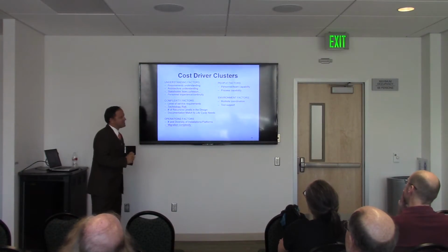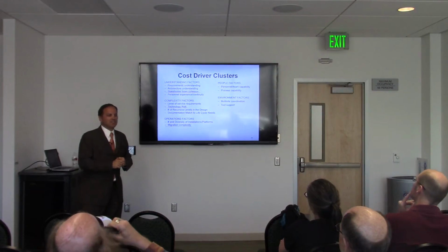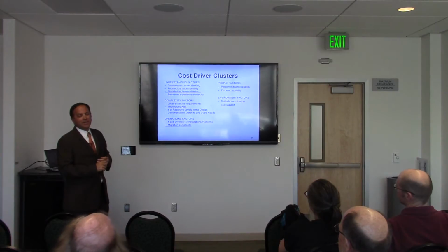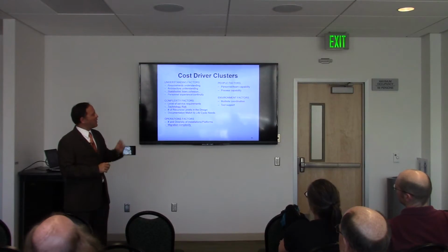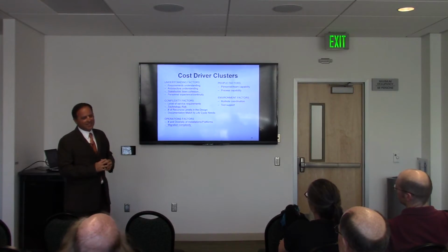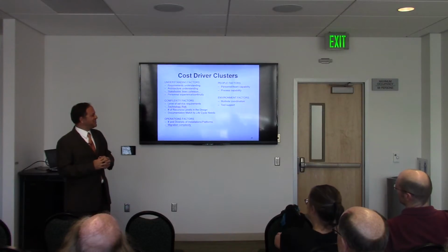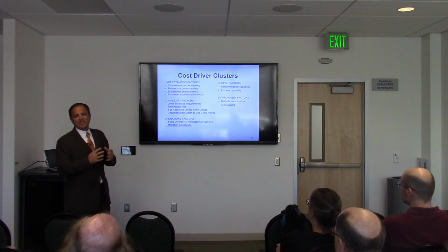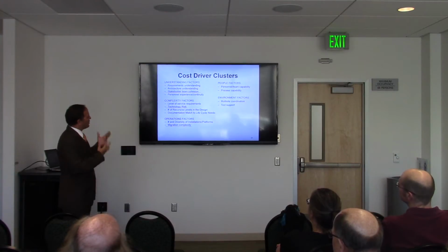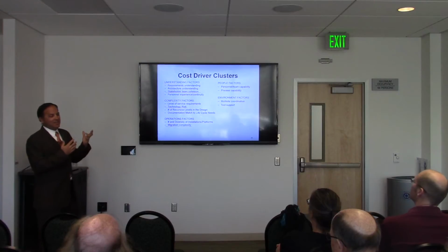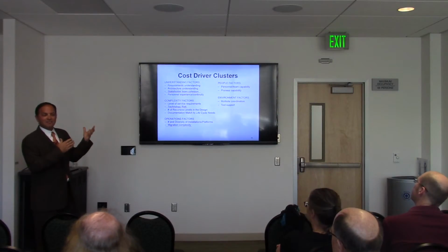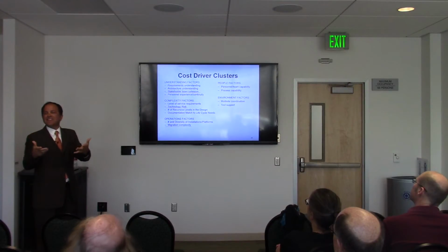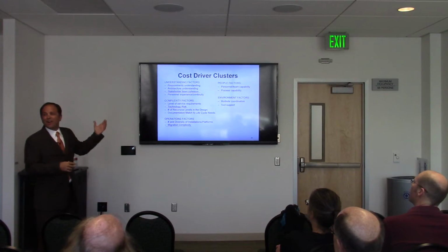The one that's underlined, stakeholder team cohesion. You're wondering, what is that? Well, that literally means, do people get along? And you would think, what place does that have in an engineering model? Well, I'm sure in failed projects you've maybe been a part of or seen, a lot of times it's the interpersonal dynamics that ruin them. So the difficult thing has been to describe something that's very subjective, quantify it, collect some data about it, and validate that it truly does belong on this list, right?